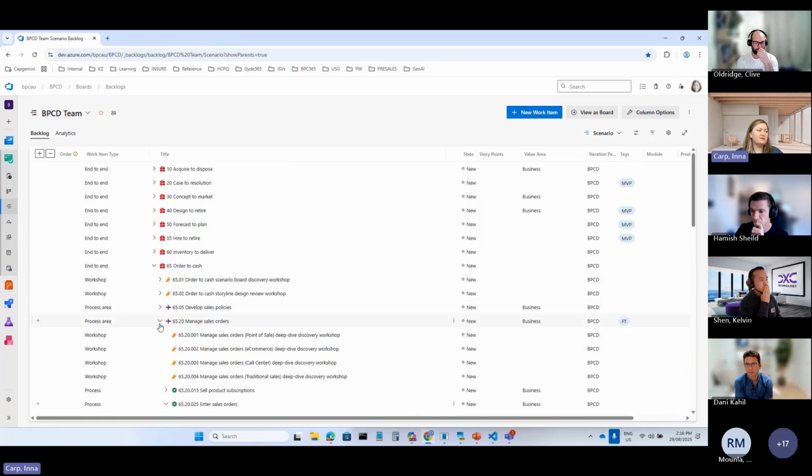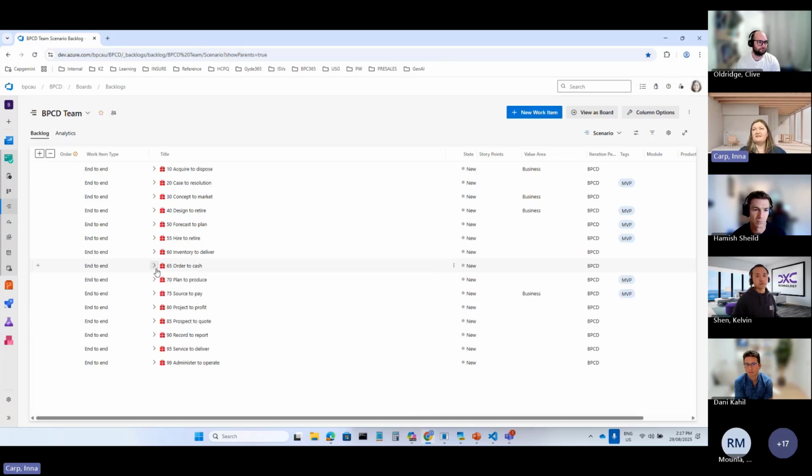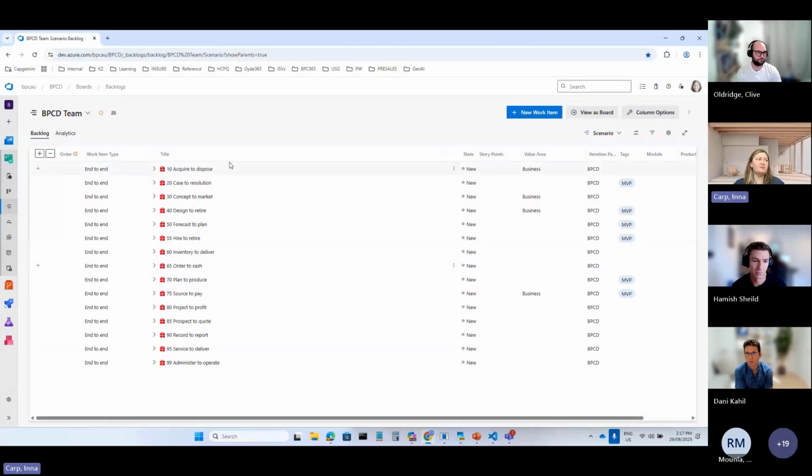And the idea is that we start a project, we use this process library to document everything that's in scope, out of scope, and then adjust our requirements with descriptions as we go. So now the idea that I have, and where I think the future is going, is that we can plan our design workshops based on this end-to-end process catalog. For example, we work in sprints in our design phase, and we have 1 week or 2 weeks per end-to-end process. During this end-to-end process, we cover everything that's in the library, and we discuss all of these things, and we decide which ones we keep in scope, which ones out of scope, and what the exact requirements are.